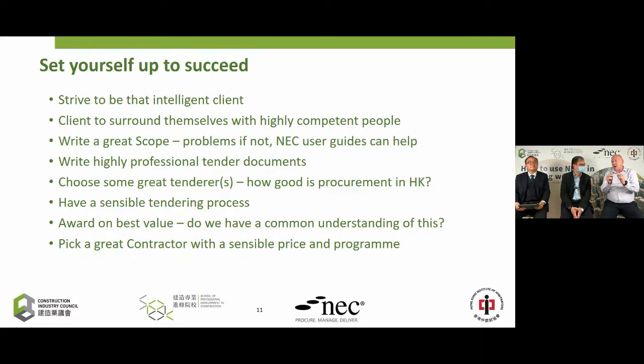So I think what we need to do in construction, I'm a particular fan of ECI and two-stage ECI in ECC contracts. To me, stage one is about using all your intelligence to set things up as well as you possibly can. Hit the button, which is the notice to proceed. Stage two, we drift into delivery mode. Just deliver it. Stop changing, stop messing around, deliver. Do all the intellect in stage one, do all the challenging, all your value engineering, all your whole life analysis, all the brilliance that we can bring to the table in stage one, deliver in stage two.